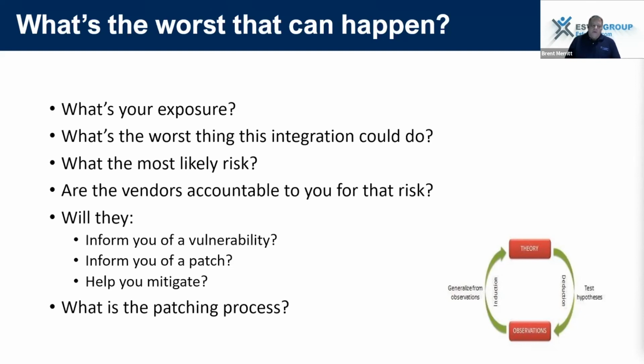Another thing is, are the vendors accountable to you for that risk? Well, that can depend, because they may have a request list for you, a wish list, to fill out, almost like a statement of work. We even have that. We have a form that people fill out beforehand so we can get an idea of how your network's laid out. You want to make sure that both of you know the risk based on how your network is set up and how they implement it, so that you can come to a compromise in the middle.